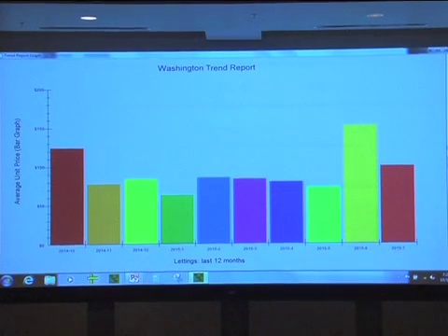Okay, I remember a few years ago when there was a shortage of titanium dioxide. You guys remember that? And what do we use titanium dioxide for? It's a pigment in our paint striping. And you could actually see this line go up as the costs were changing. So it was just really cool. And then I didn't get so far behind that curve. And you should use this tool not to predict your costs necessarily, but to watch those items that you will see that are in fluctuation.